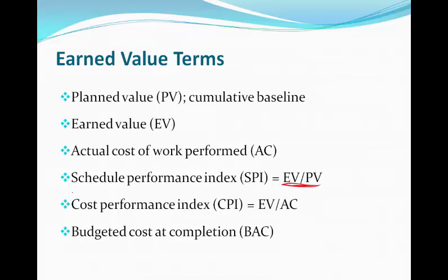Cost performance index, again, it's very similar to your SPI. The formula for that is your earned value over your actual cost, and this tells you your run rate, or your spend rate, against your planned budget.